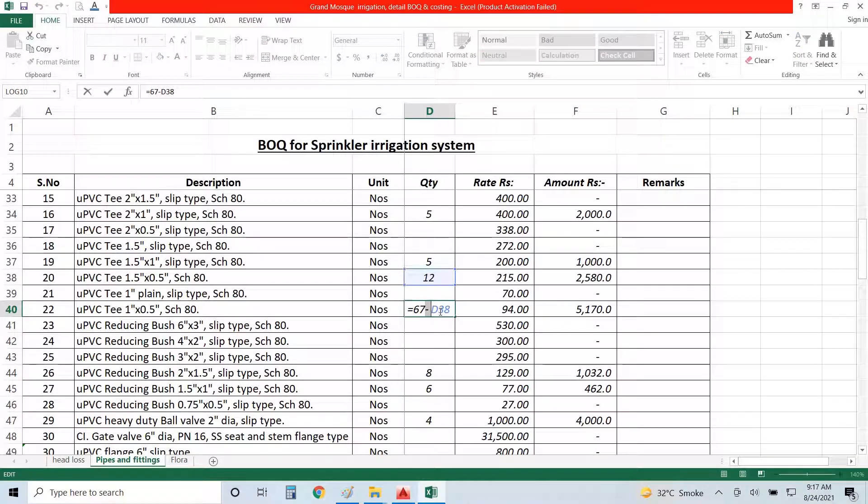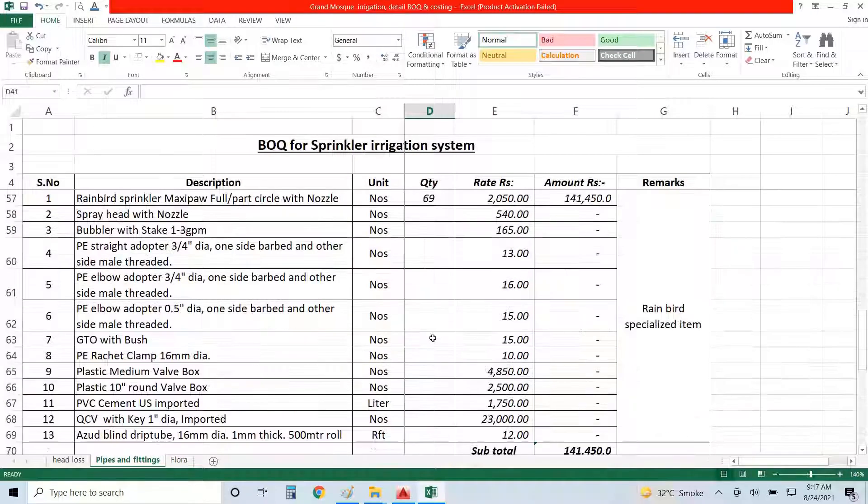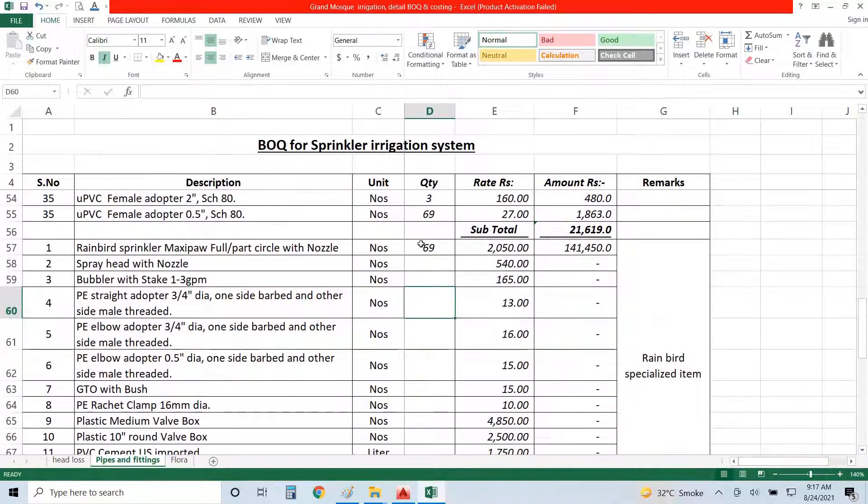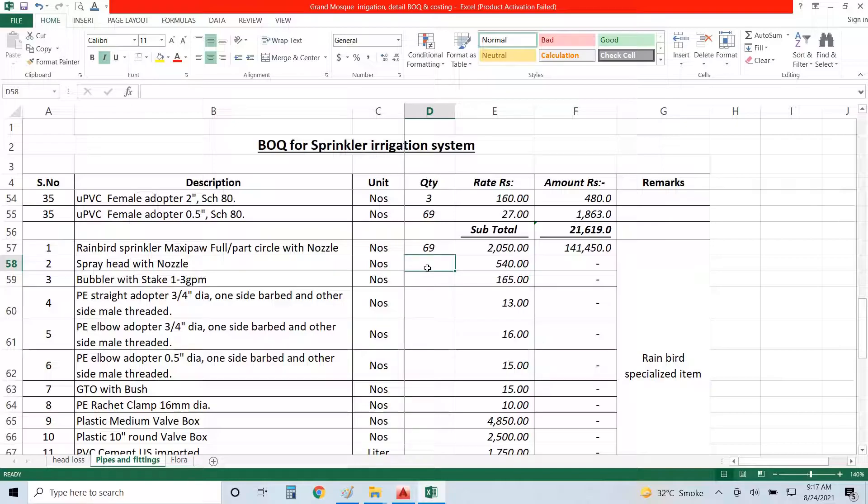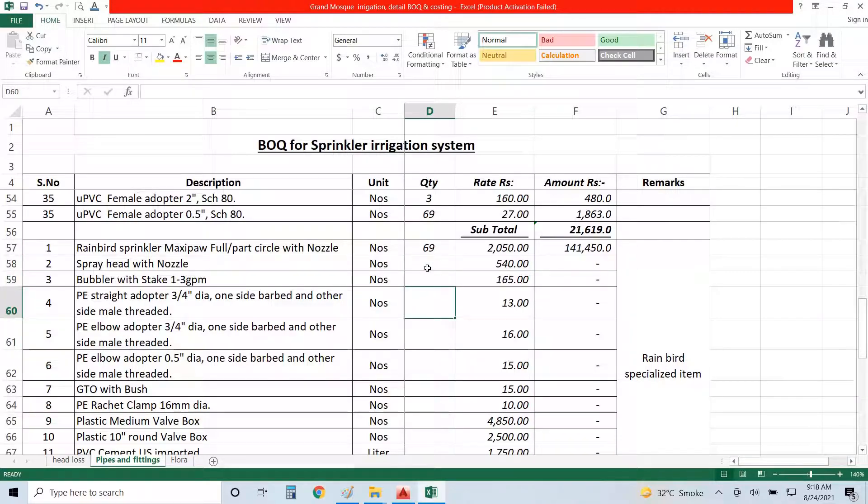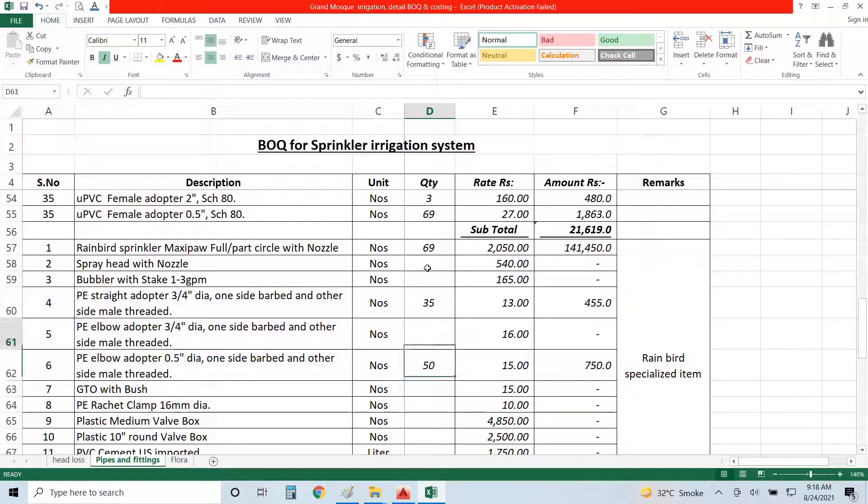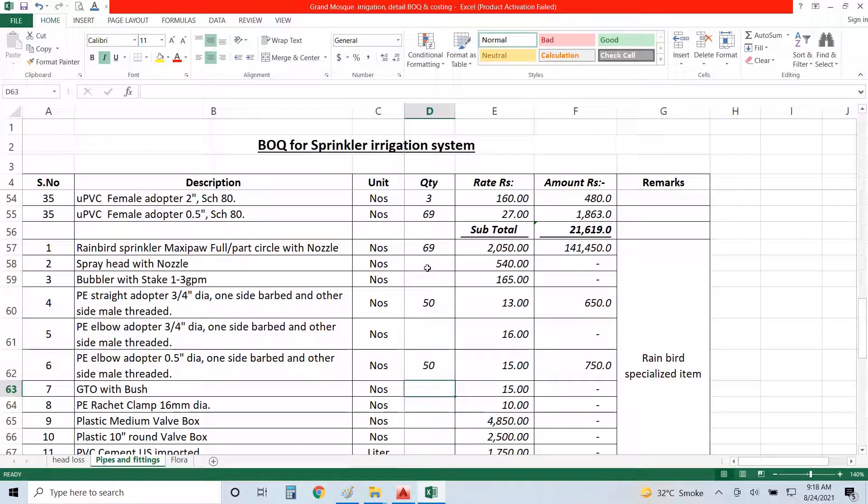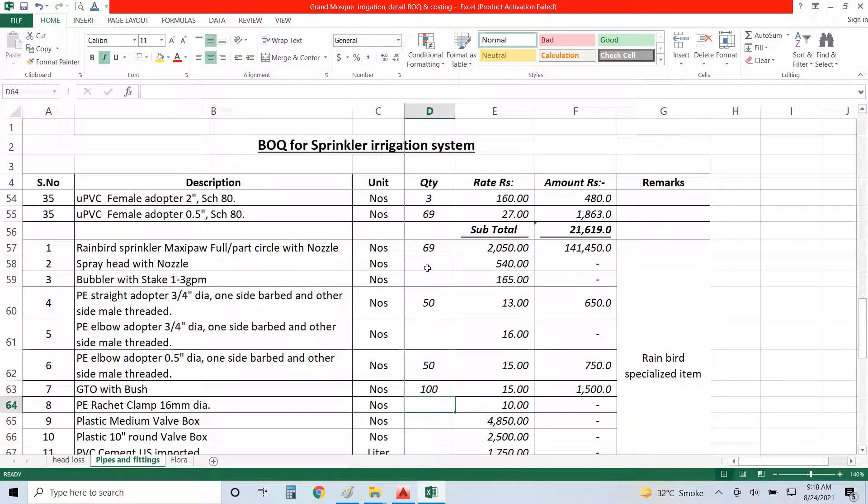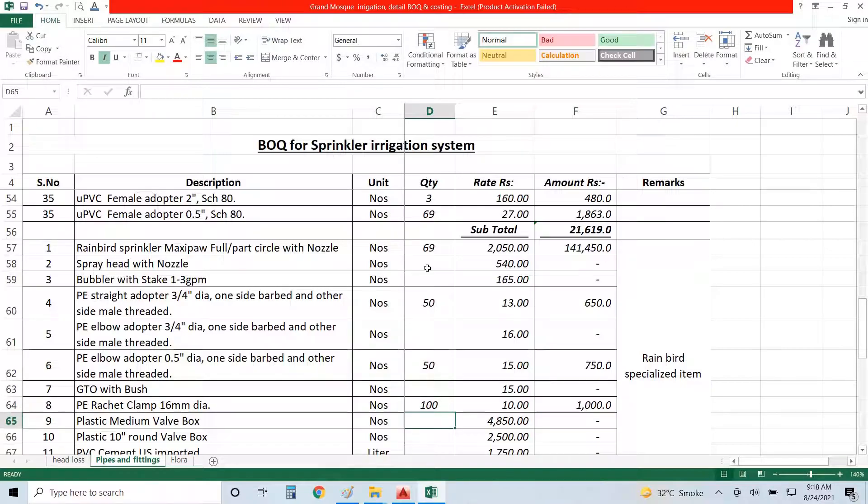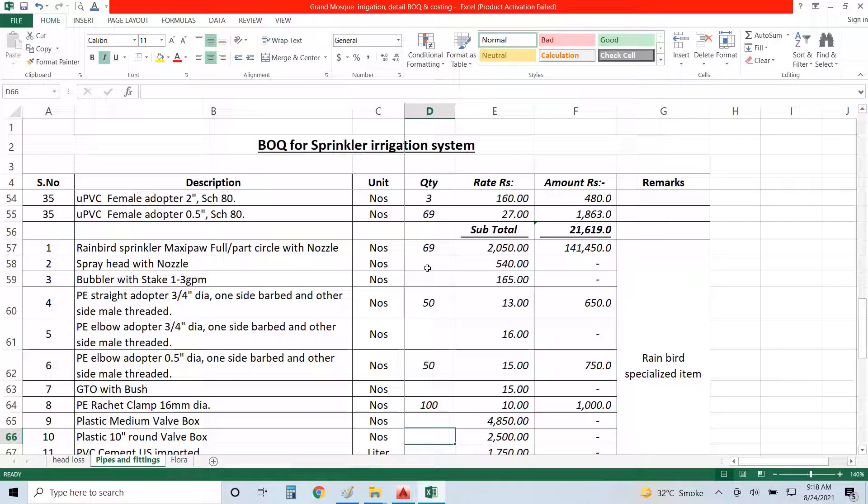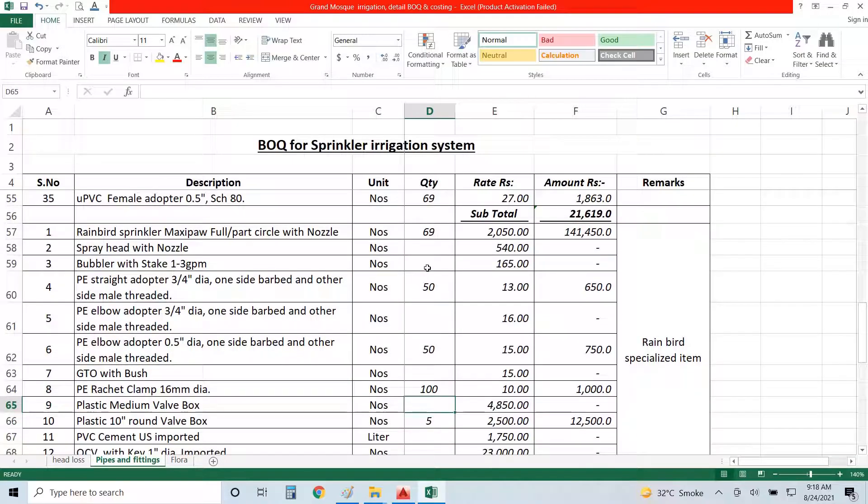I don't need sprayers or nets, don't need bubblers. Straight adapters I need 50% of it, so that is, I make it 35. And elbow adapters, yes I need three-by-four, I need those, 35, make it 50 because sometimes one will be broken. GTO bush required, no. Ratchet clamps, yes, double up those ones, so 100 required. And valve box or wall box, medium required no. I will use 10-inch round valve box for each four valves and one for my hydrant, so five are here. And I need two wall boxes of medium size, one for the pressure release valve and one for pump.